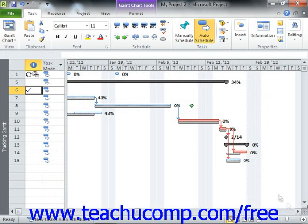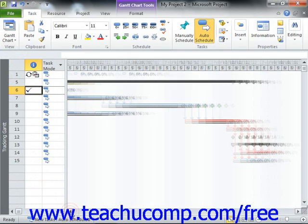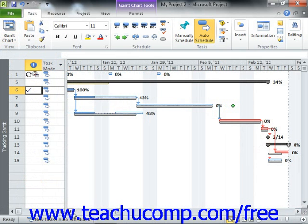In the Tracking Gantt view, Microsoft Project shows critical task bars in red and non-critical task bars in blue within the bar chart area. For non-critical tasks, the thin teal line represents the slack time associated with the task.